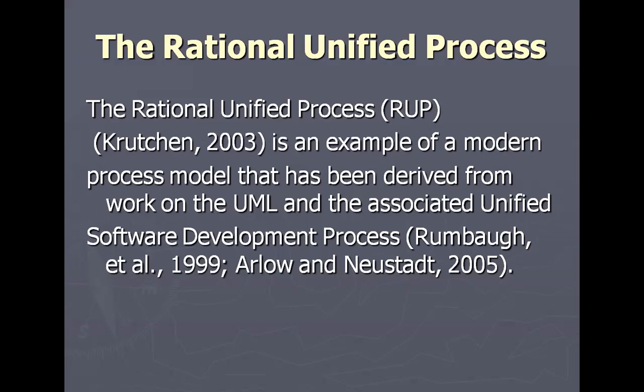RUP also allows for the addition or deletion of phases and disciplines. Each organization must decide how much of the process to implement and which roles, activities, and work products they will use. It is not unusual for an organization to have several tailorings of the RUP for use in different types of projects that are normally executed. This reflects the reality that processes need to be different not only across organizations but also across projects.